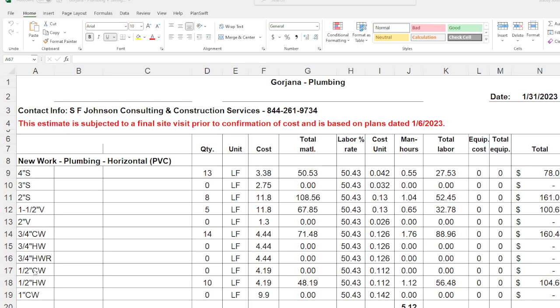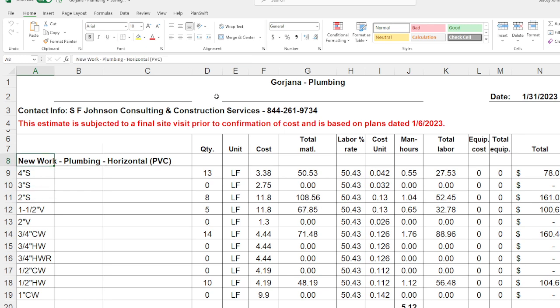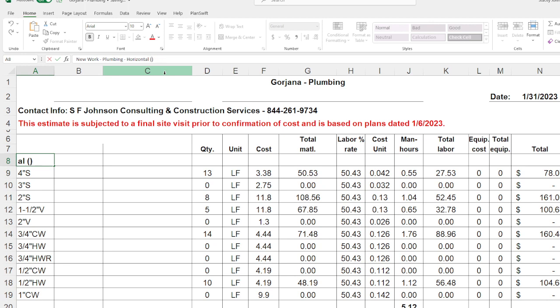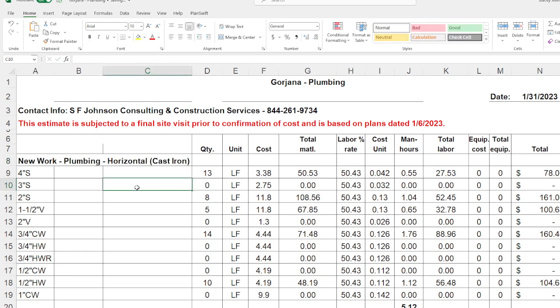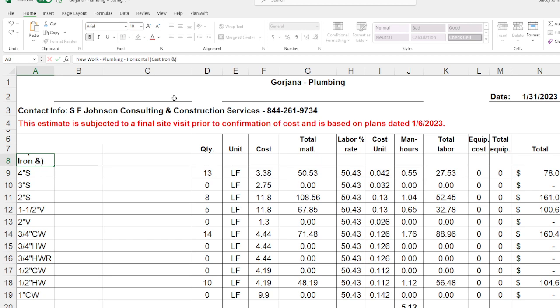So we have all of our different size pipes. You'll begin to receive the man hour calculators, which is basically an Excel spreadsheet with all of the different types of sizes of pipe. And we go by construction industry standards. So the cost unit is what we're using here, this number here. And basically, this is the number that the construction industry says it takes us to install one unit. So in this case, one linear foot of four inch. And this would be, actually I need to change that because I looked in the specifications, typically your sewer pipe is PVC, but this happened to be, these are prices for cast iron.